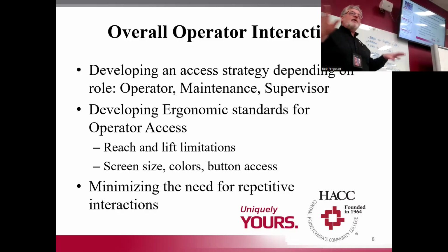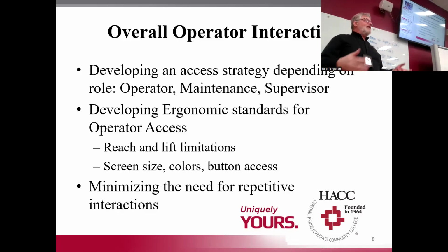So you have to segregate the work out so that each section of what you're doing will have an operator or operators, a supervisor, or plant manager be the one responsible for defining the requirements and then agreeing that's the correct result. For example, you might set up so your operators can look at the screen for turning on and off the boiler. Yay, that's good. Let them be responsible for that.